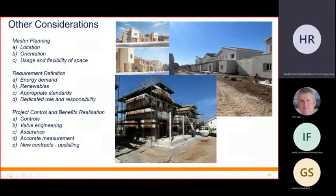So I'm going to delve into a little bit about Cyprus as part of Project Apollo, which is seismic strengthening. There's significant emphasis on understanding these future conditions, both in terms of usage and climate. What you can see here is the new build housing stock that is going in. We effectively know, ironically, that SFA remains SFA, but the climate conditions are a big one in the natural hazards. So we've started to use future climate modelling, and that is very much where we started to address the challenges around air conditioning, which no one had really considered until we added in the additional nuanced climate modelling.